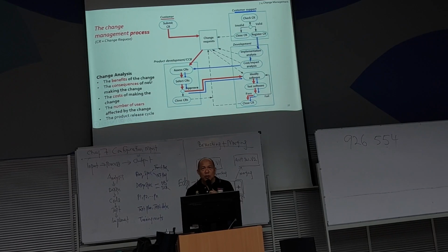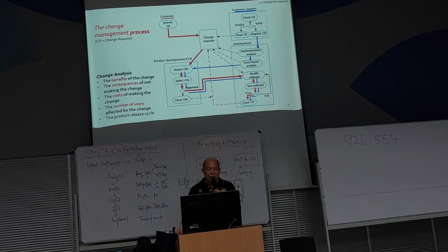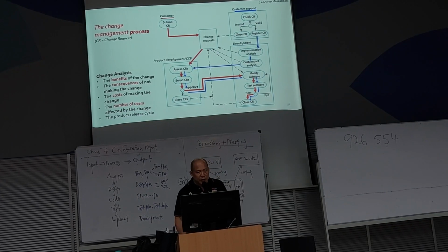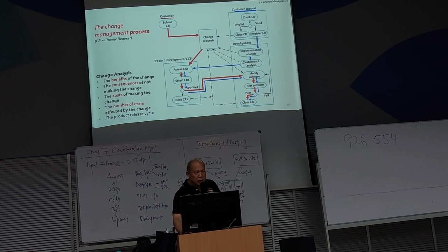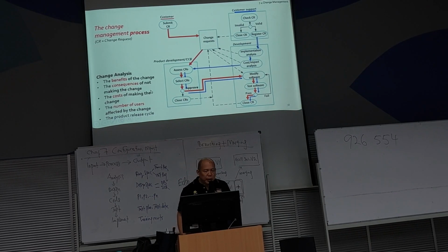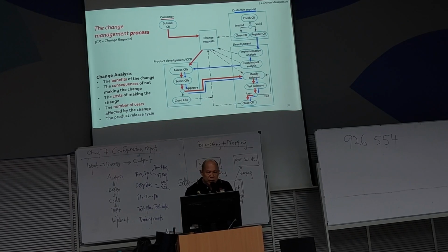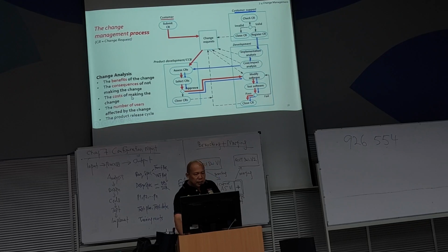If you make the change, what benefits can it bring? The consequences of not making the change: if you don't make the change, what will be the consequences? The cost of making the change, and the number of users affected by the change.